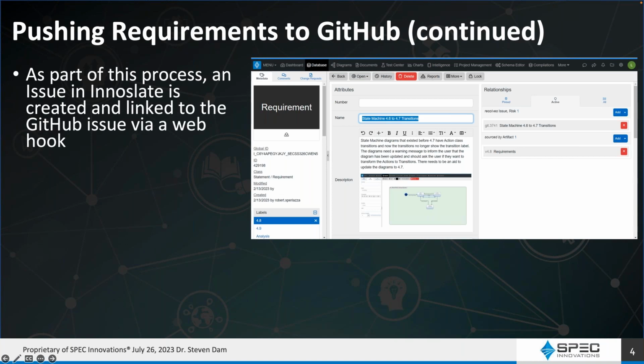We're doing that on purpose because we want to make sure that the issue is not complete just because you've got the code for it, right? You've got to have tested that code and verified it operationally. So there are many other steps before that requirement status would be complete. Just because I've got software written doesn't mean I'm done. So that's another reason to make the issues separate.